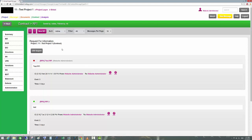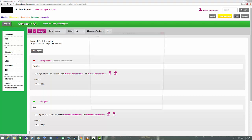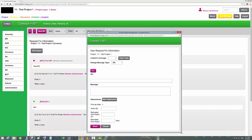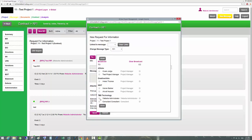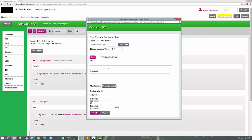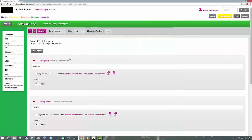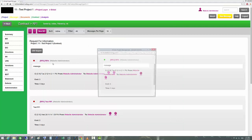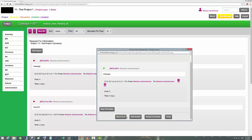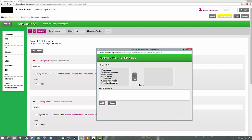For a Request for Information, click the New RFI button. Like with normal messages, select the person you want to send the request to, enter a subject, the actual message, select an action-by date, and then send. That person receives the new RFI. You can then Send On — meaning reply or forward — add an answer, or accept an answer. Both parties can also add comments or file notes on the RFI.